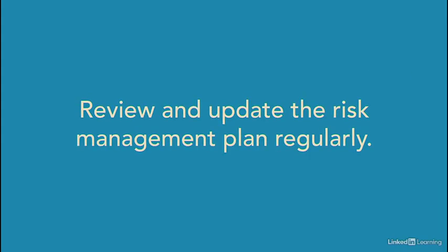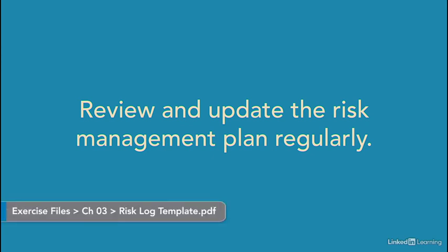Keep your risk plan up to date as the project progresses. Some risks become less likely as time passes. Other risks may be introduced because of project changes. If risks occur, track what caused them, their impact, and whether your responses are working. A risk management plan helps protect your project from things that can go wrong. For practice, fill out more of the risk log in the exercise files.